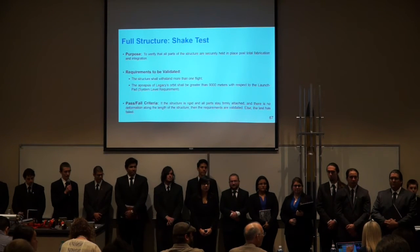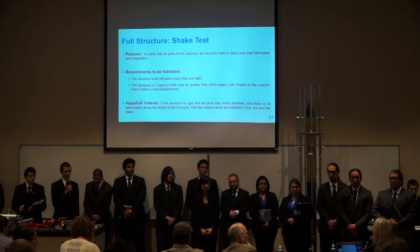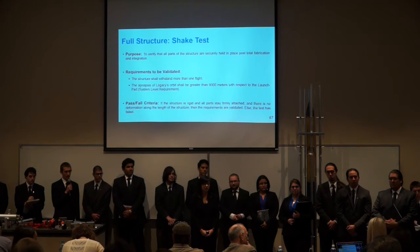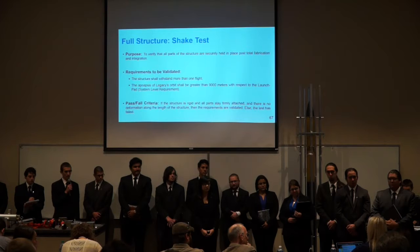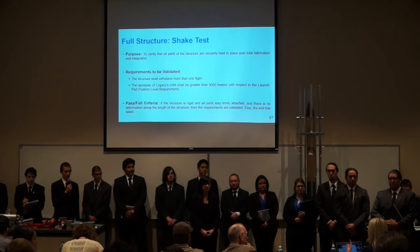And then the other comment I had, ensuring that you adhere to hardware management when you guys are kitting everything up for your final integration. It's so important because you're trying to adhere to schedule. So making sure that you have everything kitted up, fasteners, washers, all the small pieces, so that you're not running around trying to gather things when you're assembling for the last time. So that's important, and I thought you guys had a good handle on configuration management.